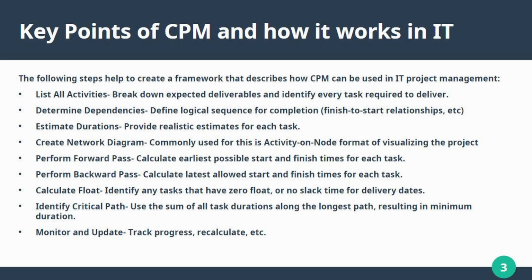Then you want to perform your forward pass and your backward pass. Your forward pass, you calculate the earliest possible start and finish times for each task. And your backward pass, you just do the opposite. You calculate the latest allowed start and finish times for each task.